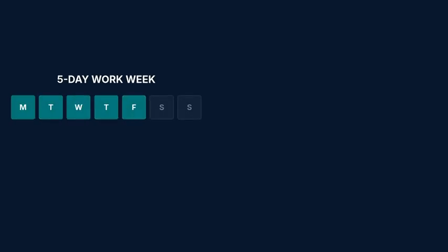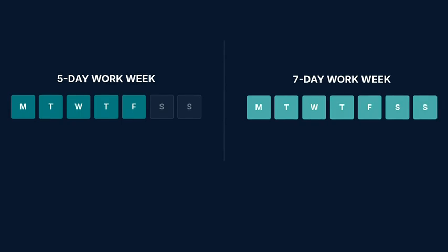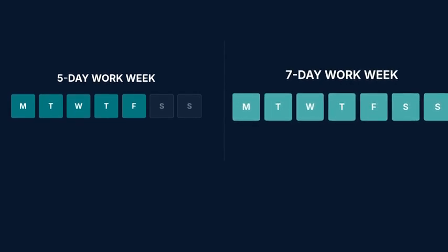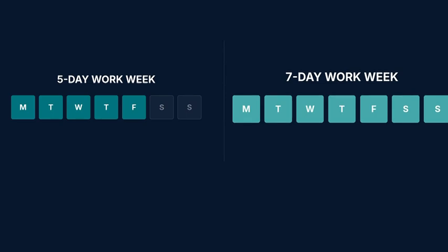Before we build the WBS, we need to define when work happens using calendars. This is where many schedules fail. For construction projects, you typically need a standard 5-day workweek calendar, a 6-day or 7-day calendar for critical trades, and specific calendars for commissioning phases that may run 24/7.